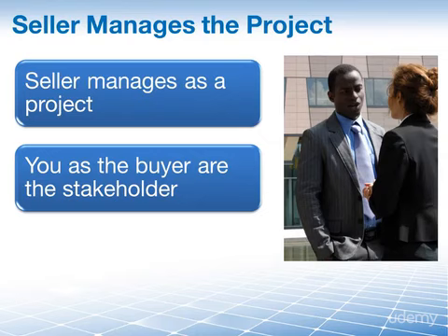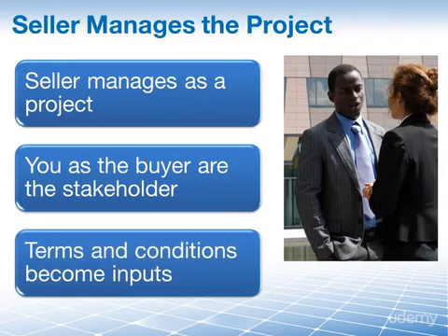Well, take a look at this from the bigger picture. The seller from whom you have purchased these buses will be setting up a project team, and that team will be working on all the project processes, not just on procurement management. And the terms and conditions of the contract that the two of you have signed, those will serve them as inputs to the processes within the seller's project. The delivery date, for instance, will be a constraint in project time management on their project. So to you, the buyer, this is plain procurement, but to the seller, this becomes a project.